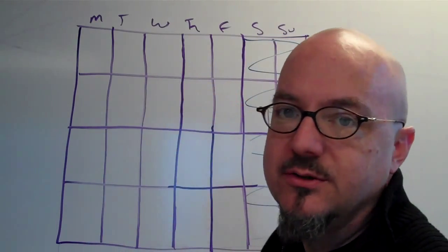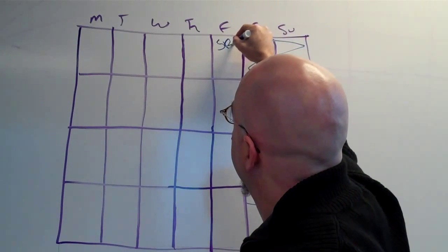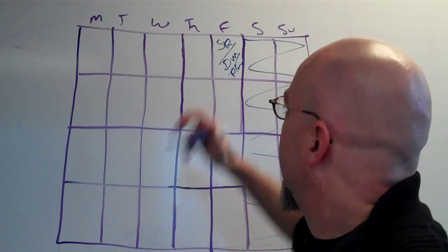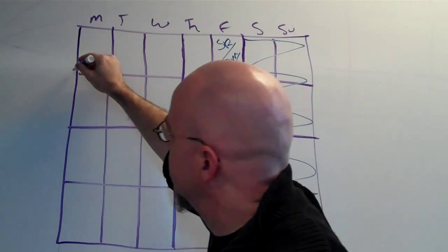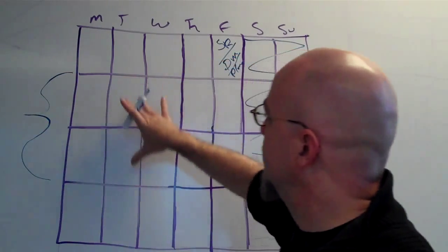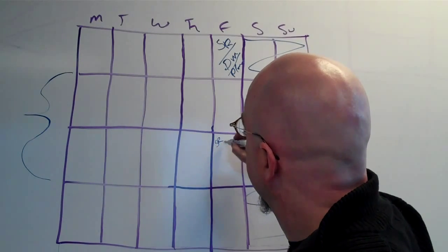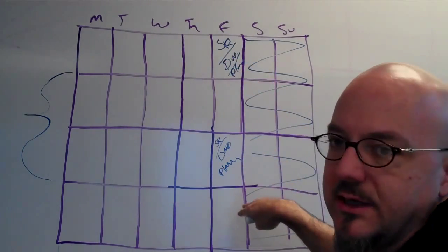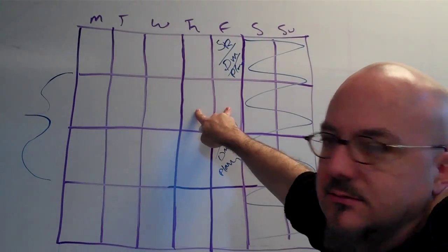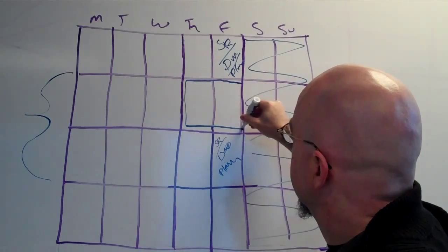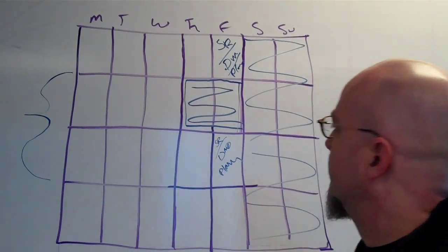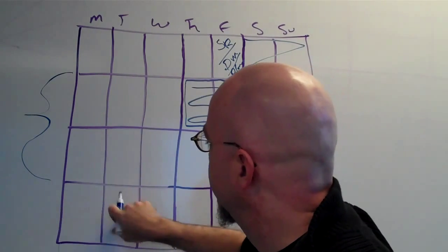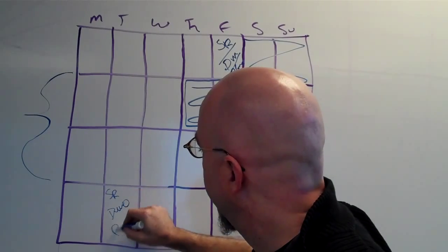So, for example, we work on a 2-week sprint, and this is our sprint review, demo and planning day, right? So we end on a Friday. On a 2-week cycle, this is the next sprint, these two weeks. And the next one here should be sprint review, demo, and planning. Can you all see that? This is a normal cycle. Now, what happens when this is Thanksgiving? All of a sudden, these 2 days are like the weekend, they're gone. Well, what I've done in the past is move this out here by 2 days. I lose 2, I move 2, sprint review, demo, and planning.